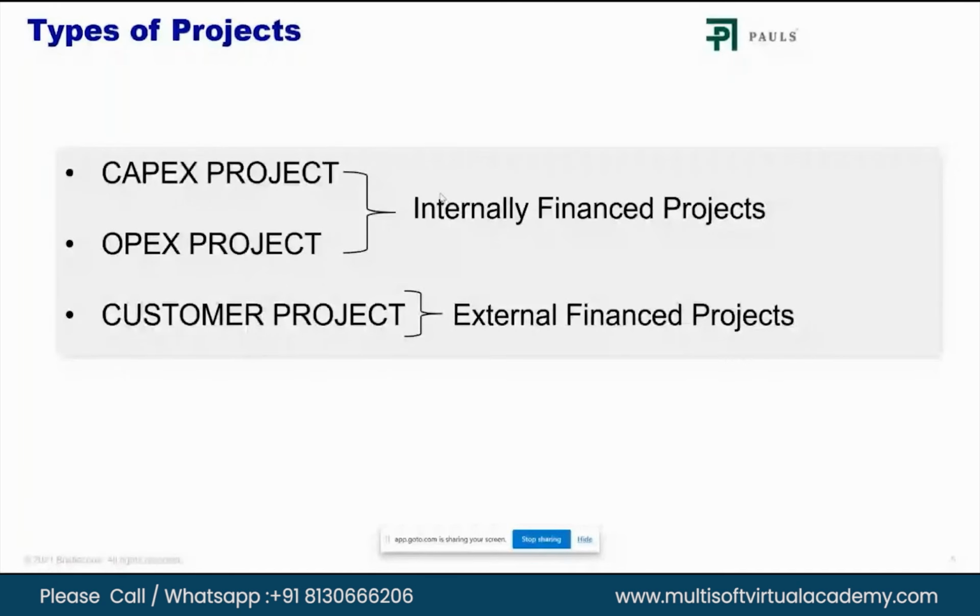Whoever is infusing that capital and building that asset, that entity is going to be managing this in the PS system. That entire expressway, during construction, the government wants to track the physical progress, the financial progress, budget versus actual of the project, and the timelines. It will be completely done in SAP PS, though it would be integrated with other modules as well. So all such financials and physical progress of the expressway would be tracked in the SAP PS module.